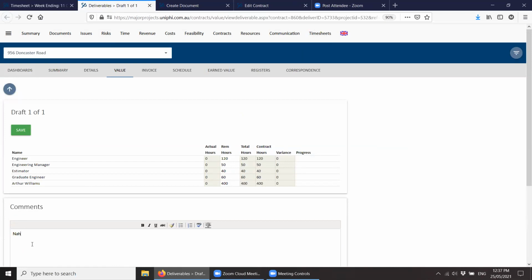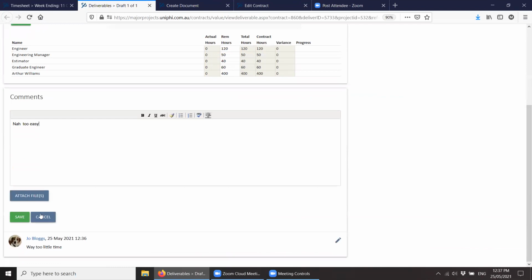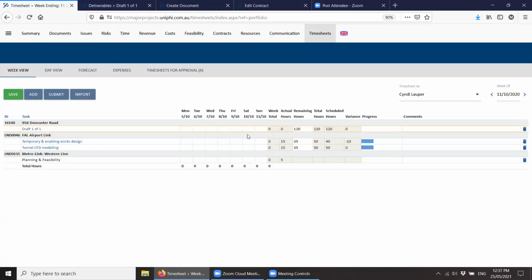Now, unfortunately, I'm still logged in as me, not Cindy, but she might say, nah, too easy, and just knock it out of the park, right? And so when she does her timesheets, she might then say, I've done 40 hours this week, but I only have 32 remaining. And hence she thinks she's going to get it done in 64 hours, 56 hours shorter than was originally scheduled. And we'll just grab that profit margin for us. Thank you very much. And forget about it when we give her a bonus at the end of the year.